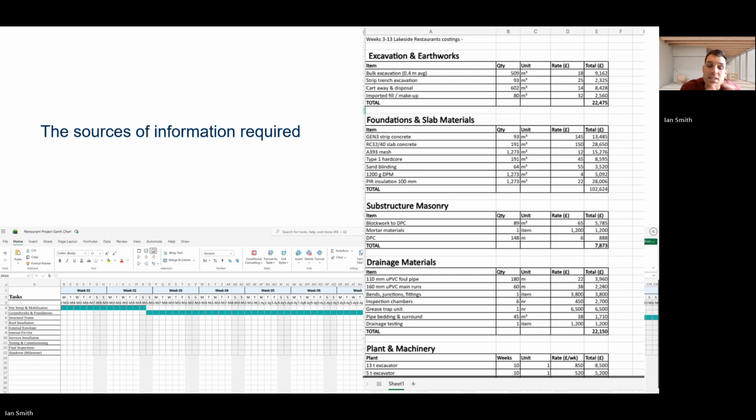There's a separate Gantt chart that highlights this 10-week breakdown that we will look at later on in the presentation. So without this Gantt chart, we wouldn't be able to coordinate labour, plant, materials, waste removal, and it would be impossible to prevent clashes and delays. So compare this with our progress against this plan, making it essential for our management control.